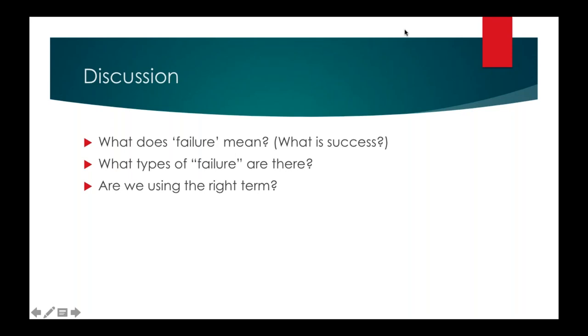This is kind of a follow-up on what some people have already been saying, but it's not uncommon, as you're starting a project, to define your success criteria. This could be coming in on schedule and on budget, but it could also include, if you're doing a website, your expected number of hits. You can lay all this out. It can be very broad, very diverse, so you know what your goals are, and they may be beyond just the statement of work.